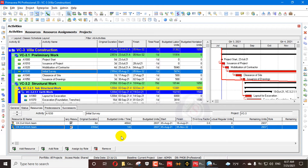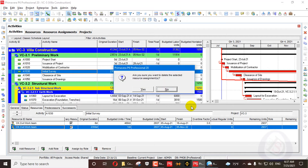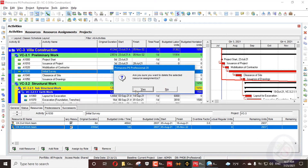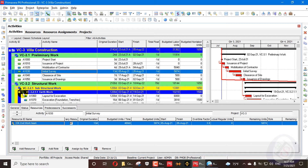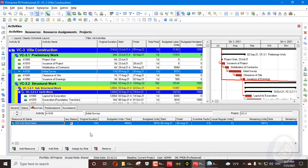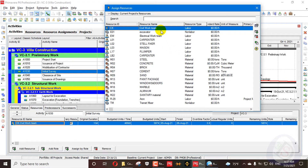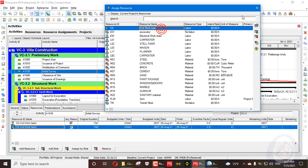We remove that one because the units are fixed. I will change it to duration per units and add the same resource again.